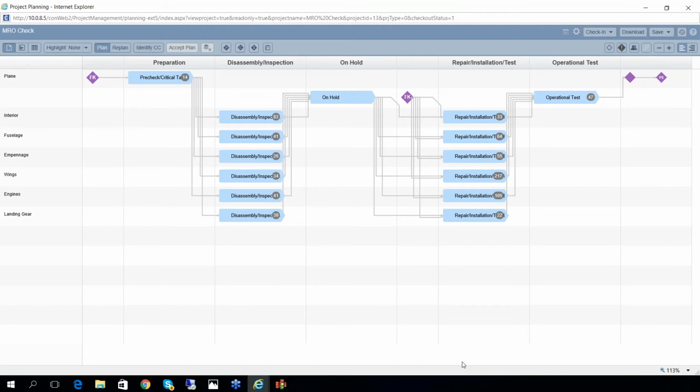When we originally implemented critical change, before we did that, the project plan was these 700 tasks, which was totally unmanageable. When we implemented critical change the first time around, we reduced this number of tasks to about 75, again a massive simplification. But even then, what we found was not really a user-friendly project plan, and even that was pretty unstable. Now with this two-tier concept, we have collapsed this project plan into about 15 tasks.